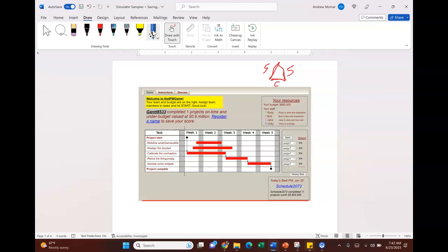If you add schedule to your project, you'll need additional budget, and you'll have to ask what scope or requirements am I accommodating. If you add or cut requirements, it will impact your schedule and of course your budget. So a change in any one of these items will result likely in a change in the other two. That's a key to integration.